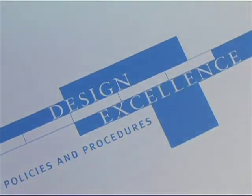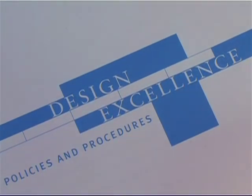Approximately 2 months prior to this meeting, the GSA project manager posted an electronic notice in FedBizOps. This notice described the project and invited interested lead designers and their firms to submit portfolios to establish their design excellence capabilities. You evaluate the portfolios submitted and prepare a short list of lead designers and their firms for further consideration in Stage 2.